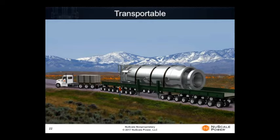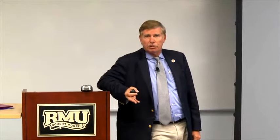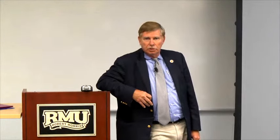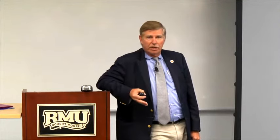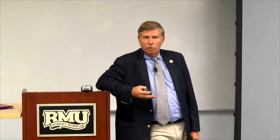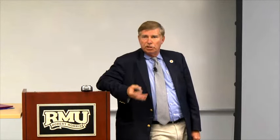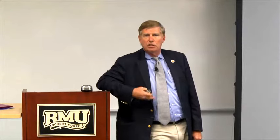And because it's 12 modules, what's that done to my timeline? And what's it done to my cost and revenue stream? I can be adding a 50 megawatt module as I go along. So I start with one, a couple months later I add the second one, then I add the third one. Oh, by the way, when I added the first one, I could close the breaker. Now I'm starting to generate money. And I keep going along in that respect. So I start generating revenue quicker. So I change the cost scheme.